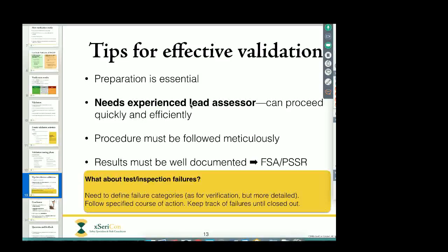And you're going to need to have walkie-talkies, people out in the field, people in the control room, people with documentation available. That person has got to be able to control and manage the whole team and to know what to do if you hit a problem, whether to stop and fix it or whether to just continue and let someone work on it while you continue with some other part of the task.